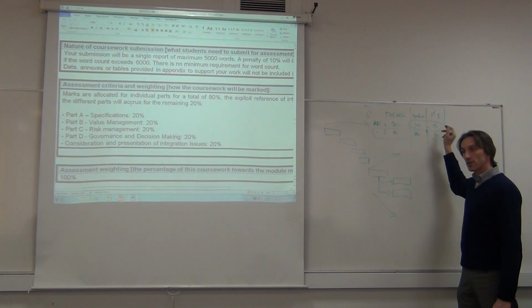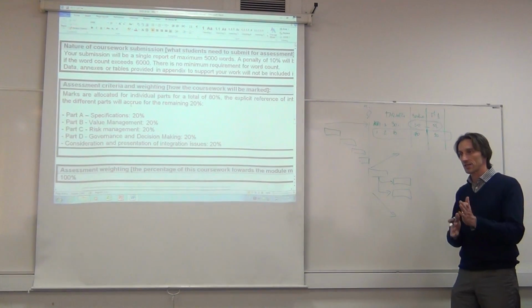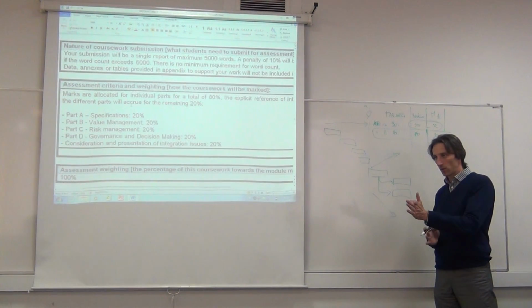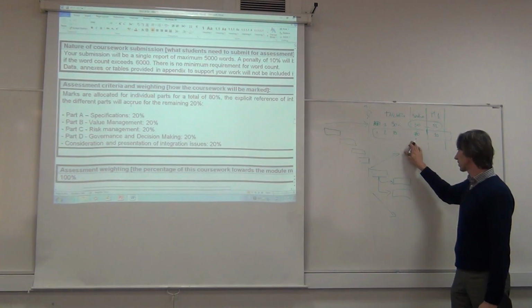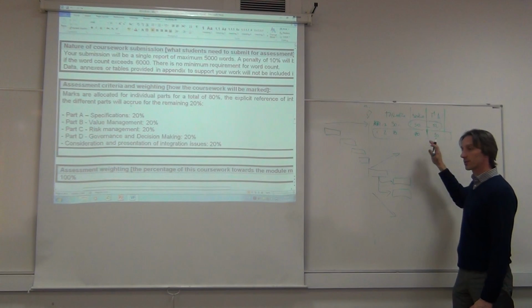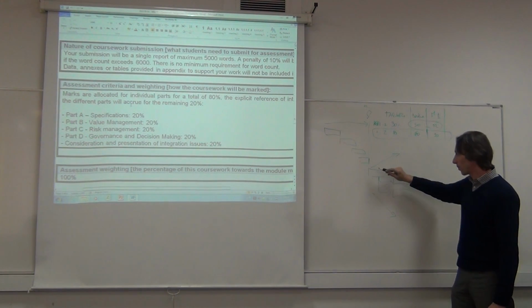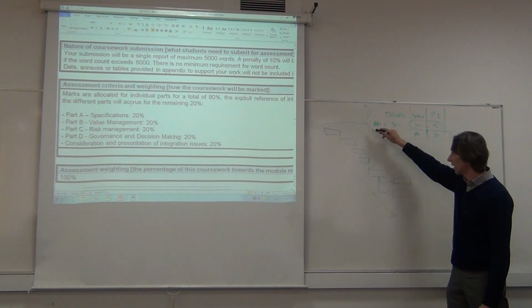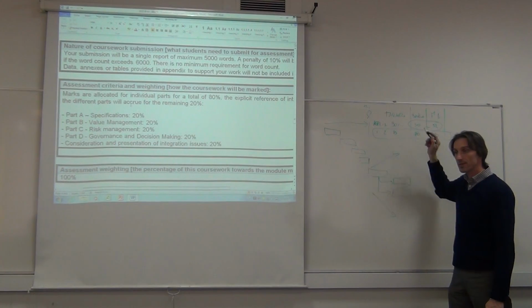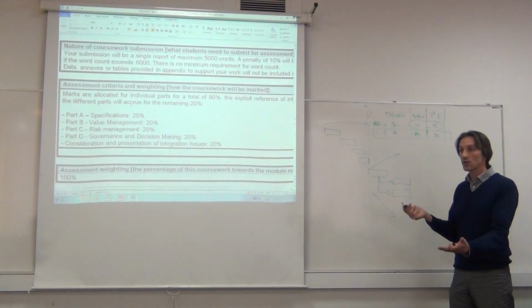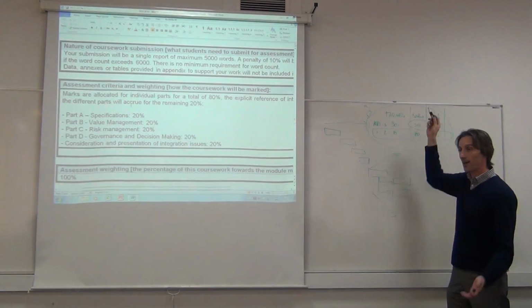maybe you don't know whether this is going to happen or not. Maybe they are all going to be progressing fairly, or evenly. But if you think that this could be the case, that things don't happen linearly, you might have processes that rebalance things. And you say, well, I'll make a decision whether I rebalance the funds every 6 months. That's a decision that you take, only because you see that this is a potential event.